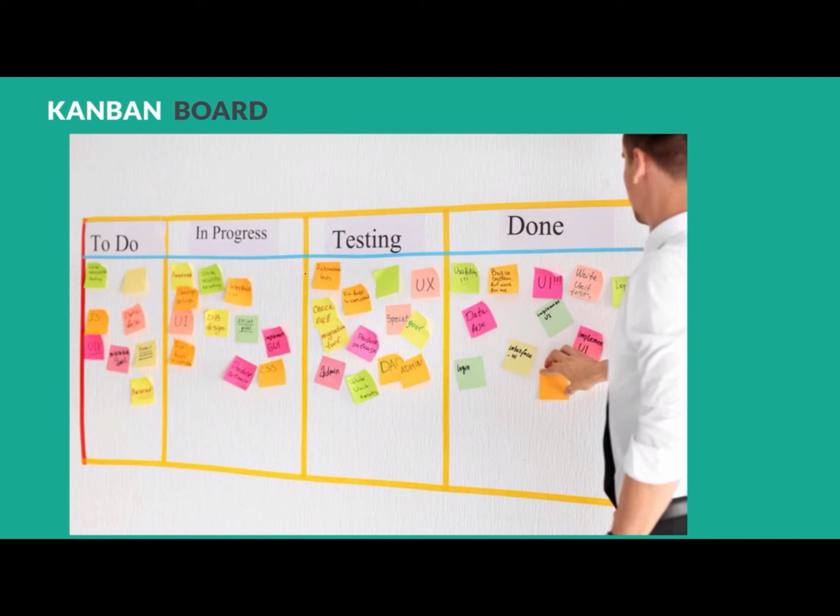So what happens in Kanban is that you write your user stories on sticky notes, and you place those sticky notes in the to-do column. When you place them in the to-do column, all your team members will come in and see, hey, this is a good higher priority. Let me pick this. They will pick. Then someone else will come in and say, oh, you know what? Let me pick this. So they will pick that user story and put it in the in-progress stage. When they put it in the in-progress stage, this means that these are the user stories which your team members are working on. Once it is completed, they will pass it to your done state. That is your Kanban board.